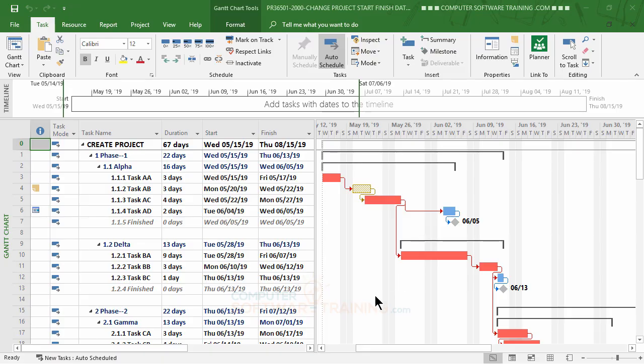And all that means is that we work 52 weeks out of the year, and all we have is Saturday and Sunday off, and that's why you see the little gray background there. But throughout the week, we work from 8 to 12, 1 to 5, and that's it. So your particular situation might be different. You might work 7 days a week, or maybe 4 days a week. Maybe you don't work Fridays, all right? Or maybe you work Monday through Saturday, let's say, all right? So whatever your situation is, the program can accommodate that.